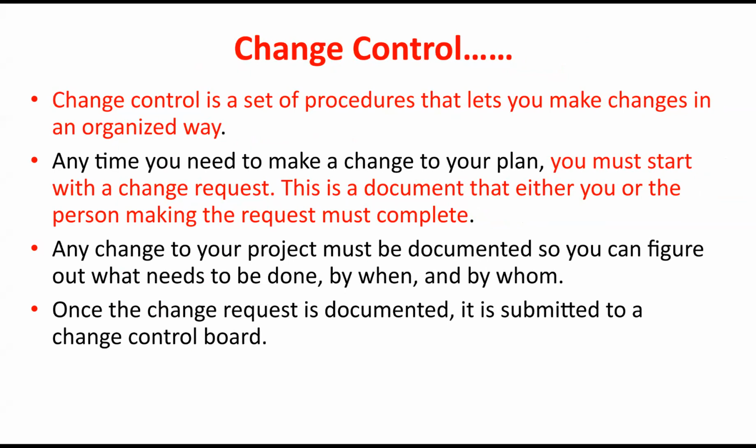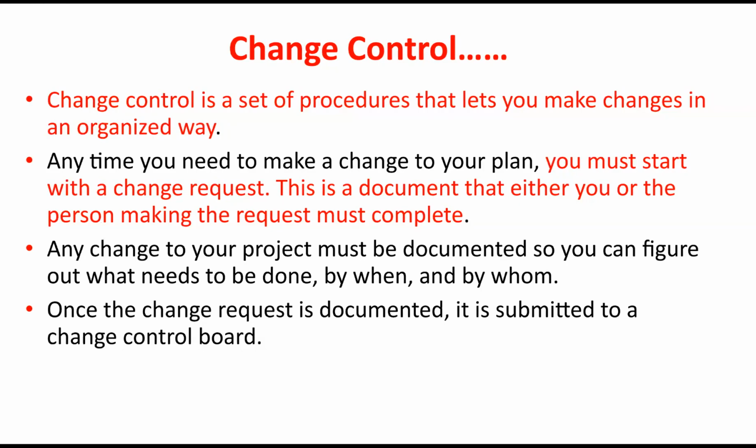This is a document that either you or the person making the request must complete. Any change to your project must be documented so you can figure out what needs to be done, when, and by whom. Once the change request is documented, it is submitted to a change control board.